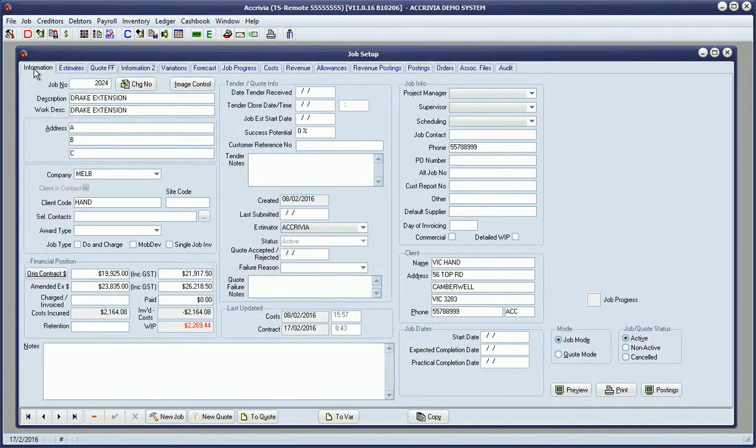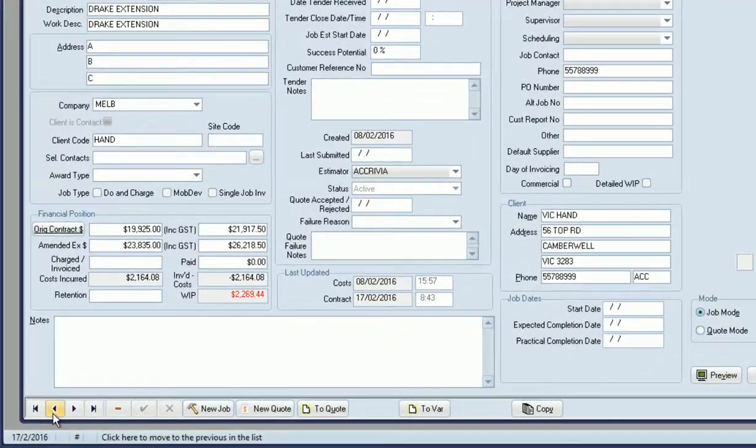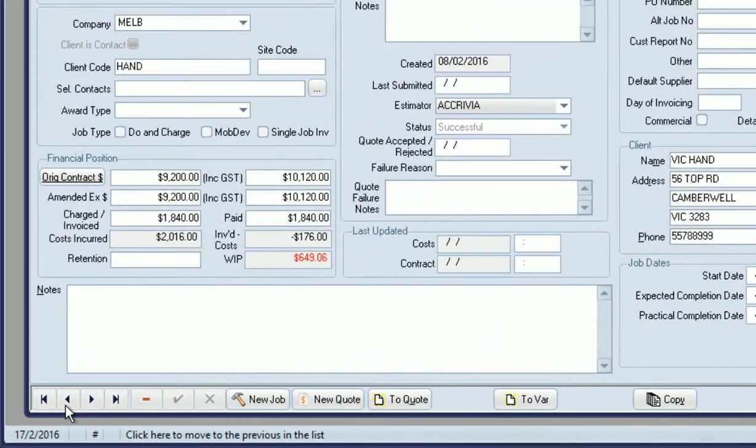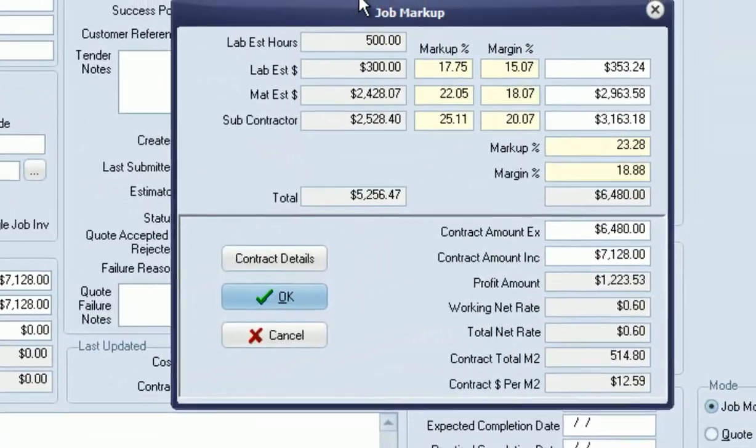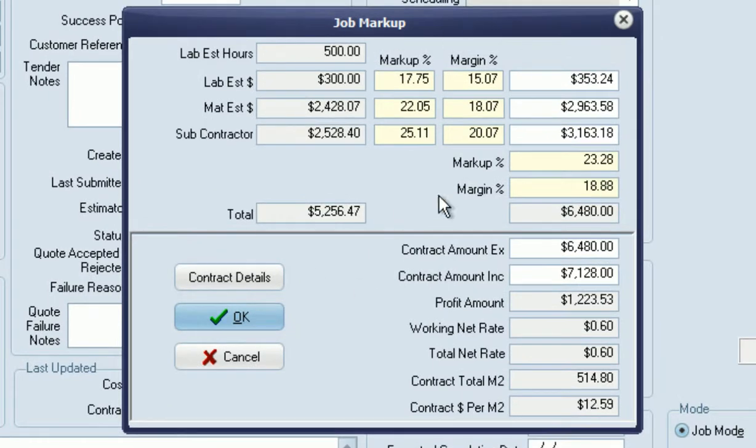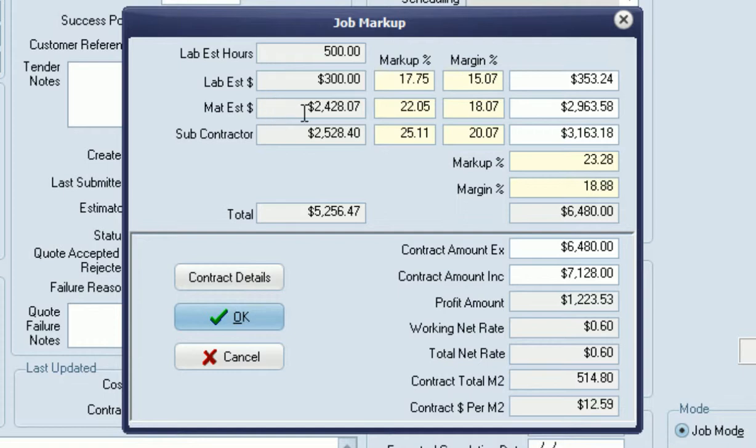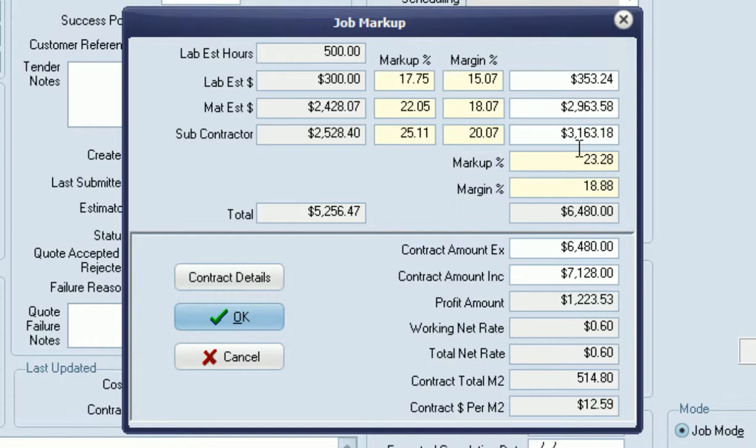The last place of direct impact for this new feature is around the markup or margins we might want to put on the estimate base. Here we have an example where the stock has come in under the materials, the labor has shown, and the subcontractors have been isolated. We can then apply a markup or margin individually on each of those three, or apply a flat markup to the totals to arrive at our contract price to the client.